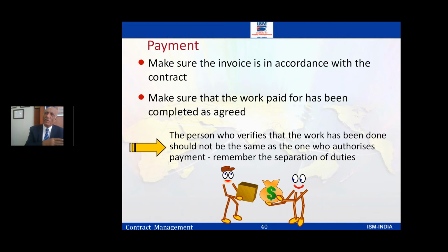So your contract should always go with changes whenever you're making changes. Otherwise, for those who are following ERP, making a payment becomes complex and difficult, because in most ERPs we give a tolerance of 5% or 10%. But if it exceeds that, and you have not documented the revised contract, it could cause difficulty.